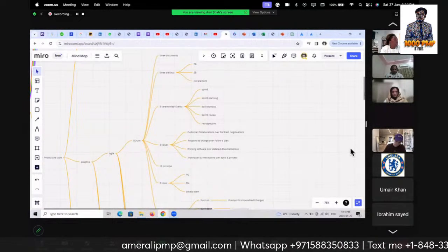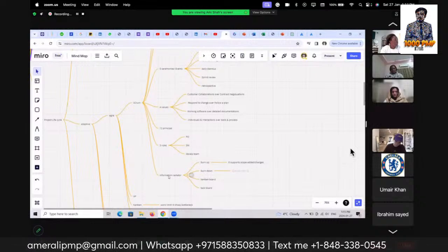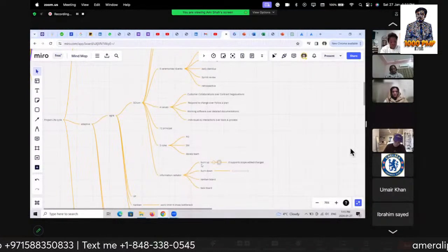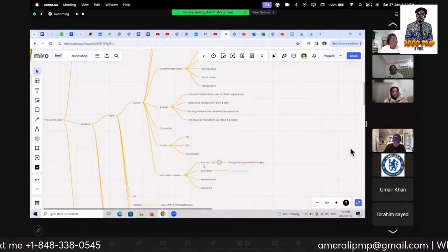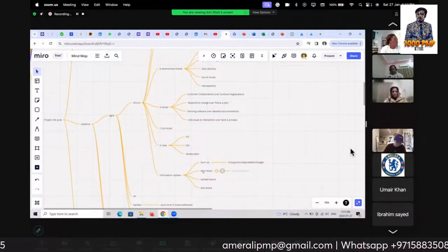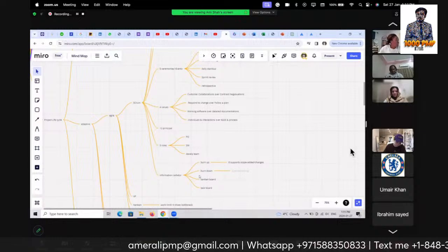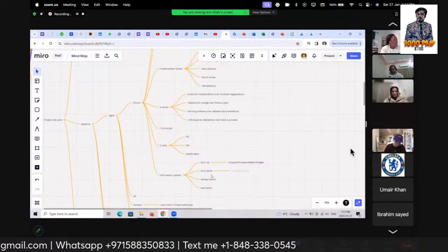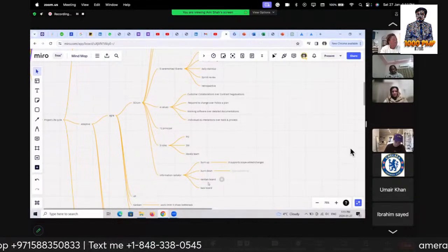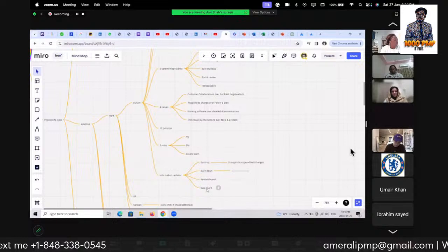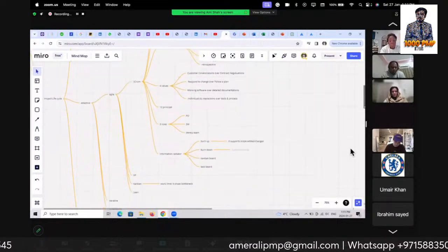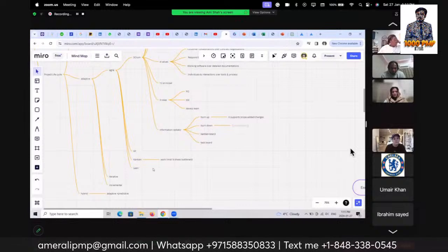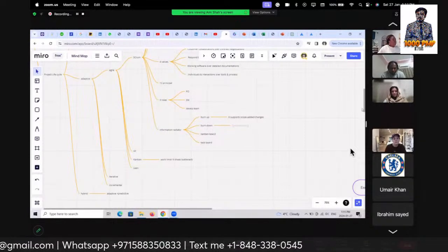We also show information through information radiators: the burn up chart, which shows the work done to date, and if any change appears, it will be shown in the burn up chart; the burn down chart, which shows what work is remaining; and the Kanban board, which shows the work limits, and task boards, which show the tasks that have been done. There are four other methodologies as well: XP, Kanban, Lean, Crystal, and Scrum is also part of them.